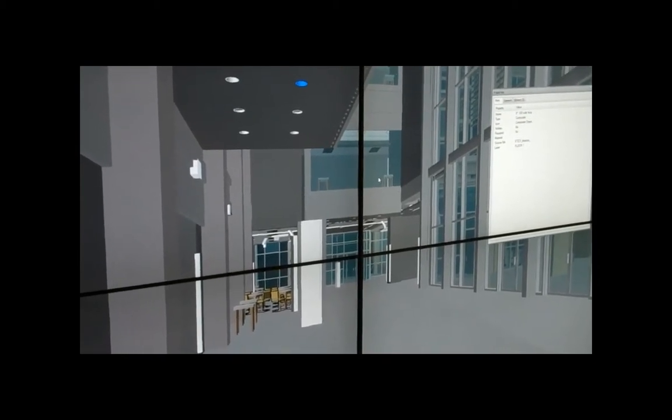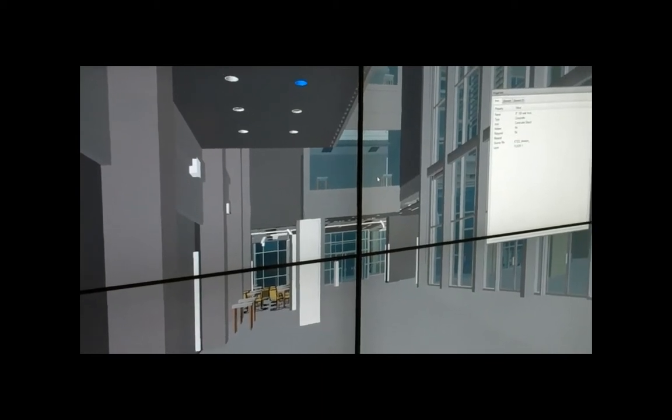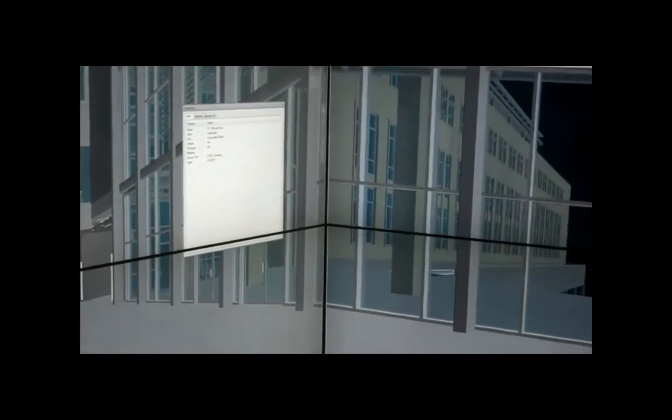Did you say the City Center 3 model? Yeah, usually people in construction may have to handle about 1,000 clashes before they start working on it. So in two months of a framework, they work as hard as possible to detect those clashes and remove as many as they can, so that they are not going to handle those clash issues while the construction is going on at the job site. If you're talking about 10 clashes, you might be okay with that. But if you happen to be talking about 1,000 clashes, then you may want to look at the situation differently.